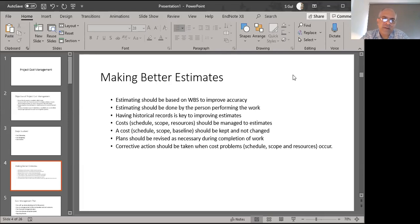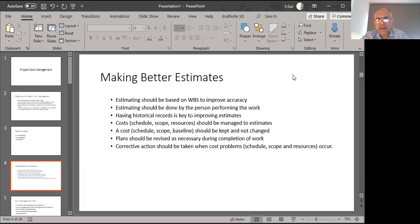Since we have a WBS, we should use it to make our estimates. Who should make the estimates? Definitely the people involved in working on the work packages — you ask them to give you cost estimates. If historical records are available, for example if your organization has already done a similar project and certain activities are similar to previous ones, you can use those historical records.